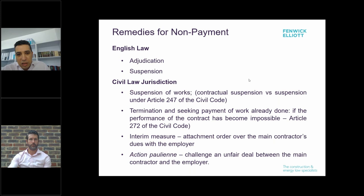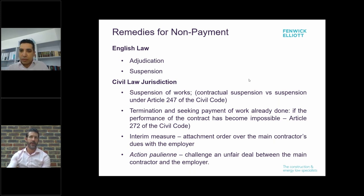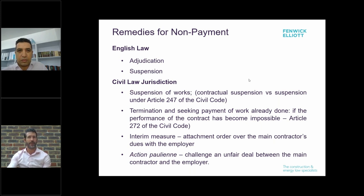We now turn to remedies available for non-payment. Patrick will cover English law first. The Construction Act, in addition to protecting subcontractors by making pay-when-paid provisions ineffective, also provides express remedies to the supply chain to enforce payment rights. The first is statutory adjudication, which allows parties to a construction contract to seek a quick independent determination of disputes during the progress of the works. Although adjudication has been somewhat hijacked by parties referring more complex disputes, one of its primary purposes was to facilitate cash flow and ensure those down the supply chain have a quick and robust mechanism to enforce payment.